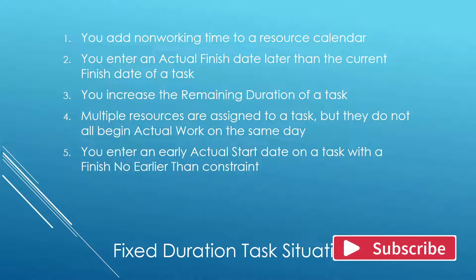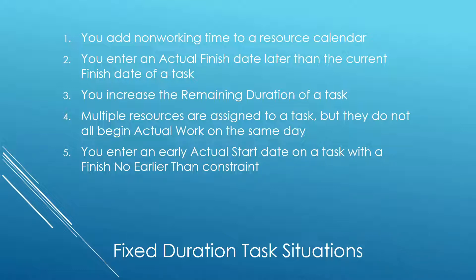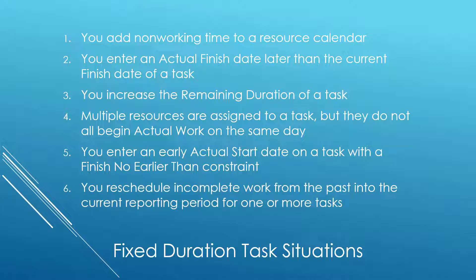Five: you enter an early actual start date on a fixed duration task which also has a finish no earlier than constraint applied to it — that's an unusual one. And six: you reschedule incomplete work from the past into the current reporting period for one or more fixed duration tasks.